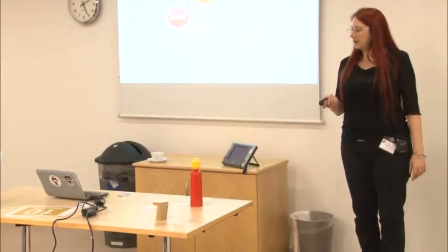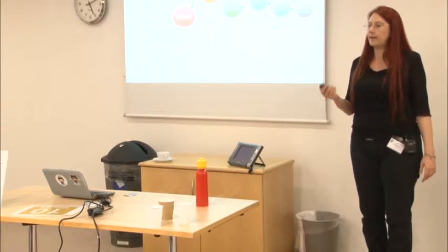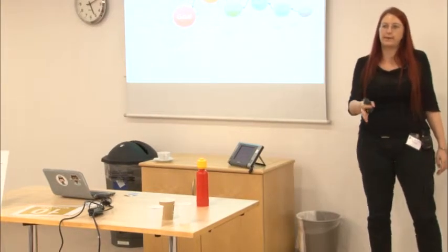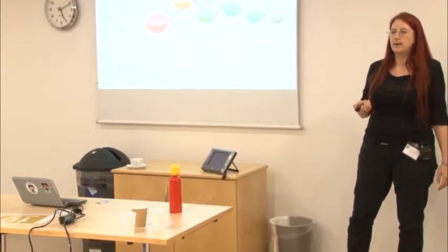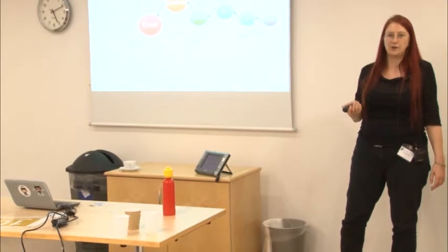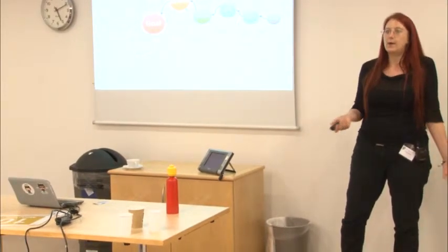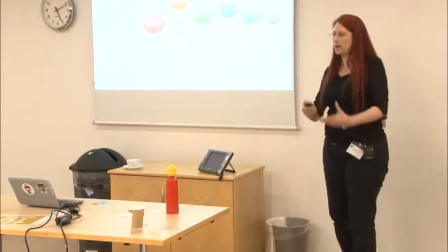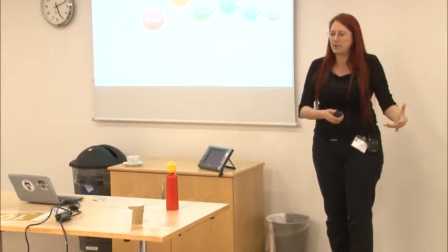I have a goal, capabilities, and I will always look for whichever one is newest, hasn't been delivered first. What's the most interesting scenario? Can we find one scenario that has never been addressed? And start with that. And code that, and hard code the connections to the database because they're boring. We know how to connect to a database, right? Just hard code the data, get the UI in front of people because they've never played with that UI before.